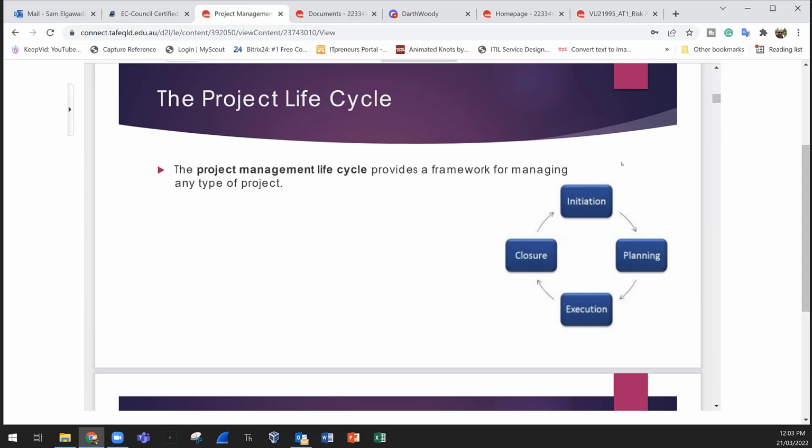So in the initiation, we will have the scope of this project. We will have the project manager assigned. We will have the project team chosen by the project manager. So we will have what's called initiation. We will have a rough idea, a very high level scope, and also the budget needed. Do we need $1 million or 2 million? We can't say. This is not a defined scope. So for a defined scope, we will say, okay, we will need around 1 million. If it's 100 above or less, this is fine, or 200, we always have this margin, but it is not like double the cost.